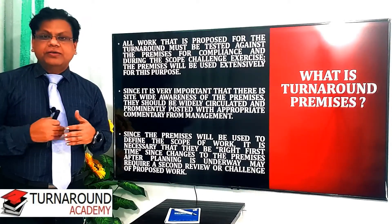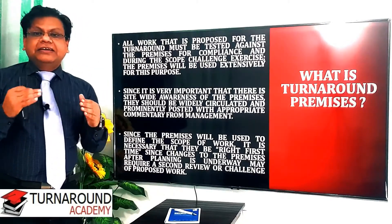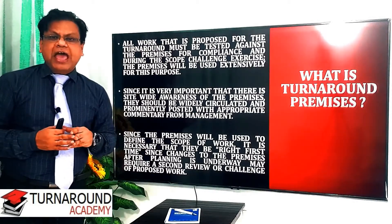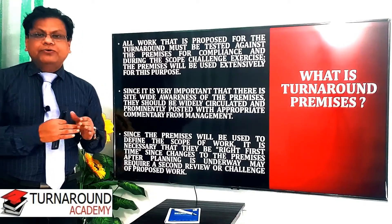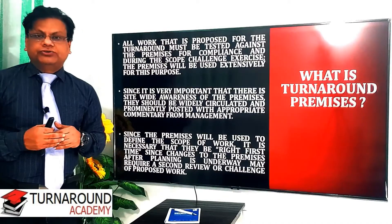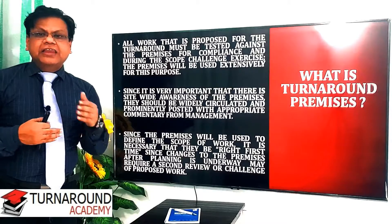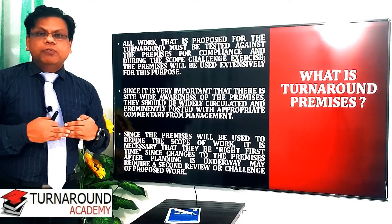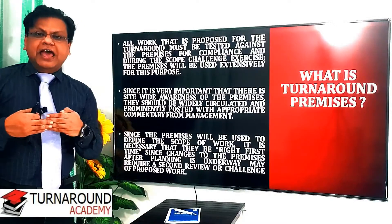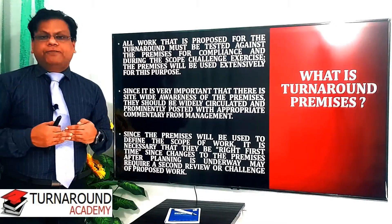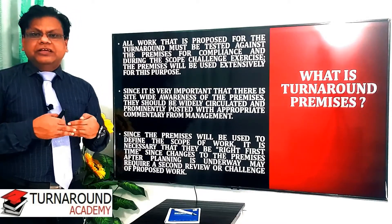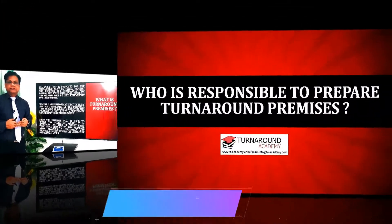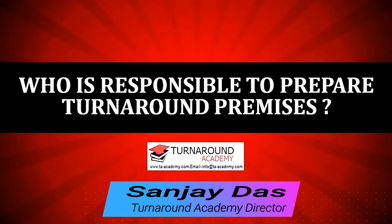Turnaround premises are generally released 18 months prior to the feed-out date, at which time you may have only 90% of the scope of work. Management will declare the budget and duration for the turnaround at that point. However, while doing detailed planning, you may find that with the given budget you will not be able to deliver all the scope of work, or the duration given in the premises may not be enough. In that case, you need to amend the turnaround premises accordingly.